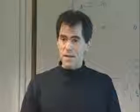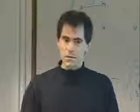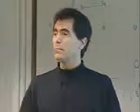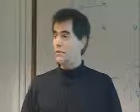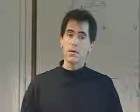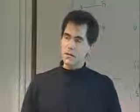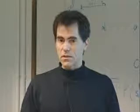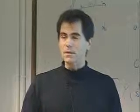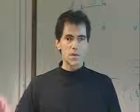And it's not based on taking a look at all the design drawings and saying, okay, this costs this much from the vendor, this costs this much, and you put it all together. That's called a bottoms-up assessment, and it's more accurate. But it also relies on having an accurate design picture, which obviously you don't have early on in a program. So it's almost like a black art to take a requirement set and craft a design early on, or at least bound the design and bound the cost. Because again, early on what you're trying to do is get into the cost envelope and still meet the scientific objectives that you're trying to achieve.